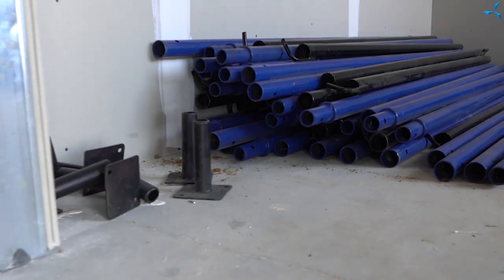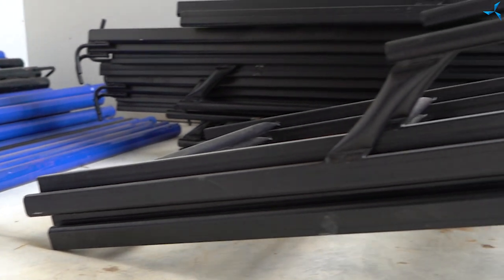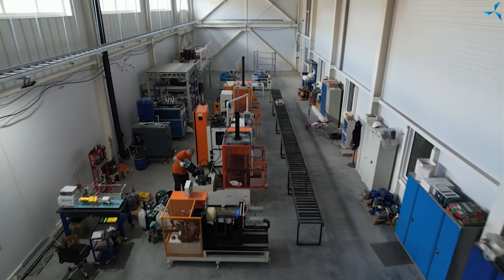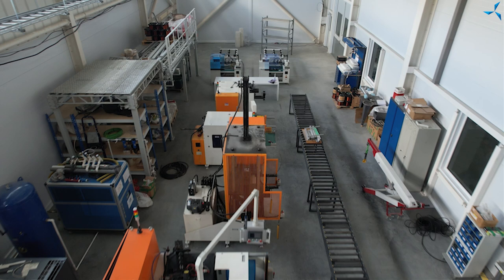We are also preparing for reception of the installation crew, who will install all four lifts, two in the administrative and utility building and two in the production part of the building. Special scaffolding has been purchased for that, special platforms will be prepared so that the installation crews can perform their work. The commissioning of the equipment is ongoing as well. Right now, behind my back, we are continuing commissioning work on the induction motor production line, starting with size 90 and ending with size 132.